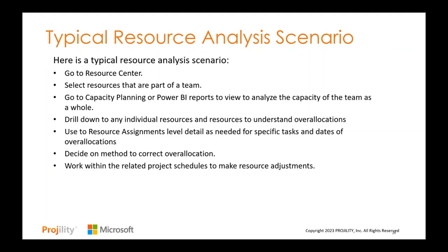So a typical resource analysis scenario starts in a resource center. So you're bringing on a new project, you're planning for it, you have some dates or potential dates for the project, and you can select the resources that you would like to be part of that project team. I always recommend starting with that analysis first so that you can get an idea of if and when you have the bandwidth.